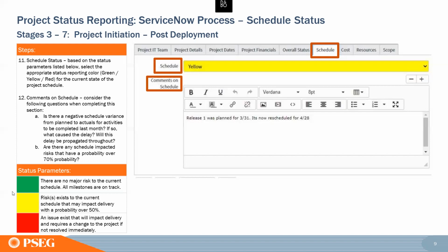And I will tell you, if you're getting a justification document or a change request done to move the dates on your project due to an issue, the answer isn't, "I'm going to be green next week because I'm getting this justification done." You really want to think about, has the risk actually been closed out, or does this risk still exist? And you may get hit with another change request later. If the answer is the second, then you want to make sure you put it red, you explain what happened and say, we haven't really resolved this risk yet. This risk still exists and could impact this project again, even though we have justification for moving this date this time.